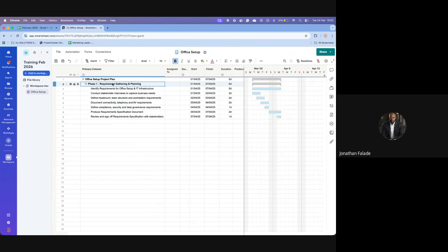So that means it will pick the earliest start date of the activity within it, and likewise the latest finish date of the activity within it. That is what it will pick. It doesn't mean, please be mindful, it's going to pick this first task as its own starting date if there's another task within here that starts earlier.